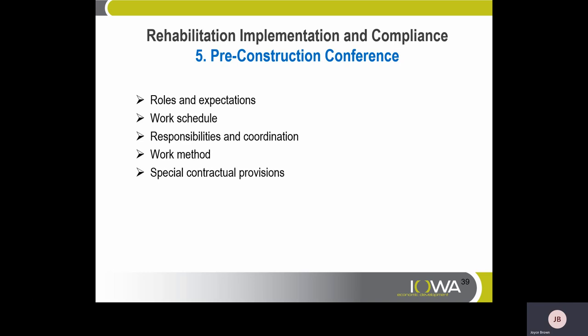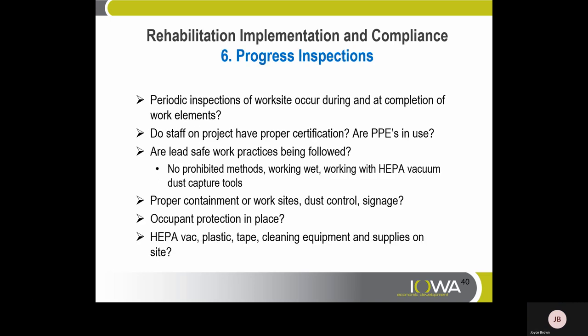Stage five — Pre-Construction Conference. This includes roles and expectations, the work schedule, responsibilities and coordination, the work method, and special contractual provisions. Step six — Progress Inspections. Periodic inspections of the work site occur during and at completion of work elements. Do staff on projects have proper certifications? Are PPEs in use? Are lead-safe work practices being followed? No prohibited methods — working wet, working with HEPA VAC, dust capture tools. Proper containment of work sites and dust control signage should be in place.